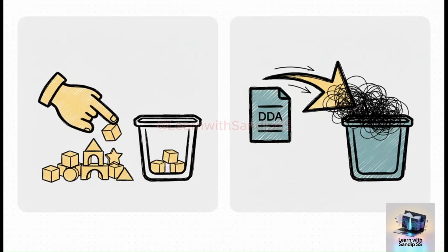Now you've got two ways to get that scope from the DDA into Cloud ALM. Option 1, you do it manually. You go through and select each business process one by one. This gives you tons of control. Option 2 is the fast track. You import an Excel file that's been exported right from the DDA. The only catch is you'll probably have to ask your customer to export that file for you. So control or speed? The choice is yours.